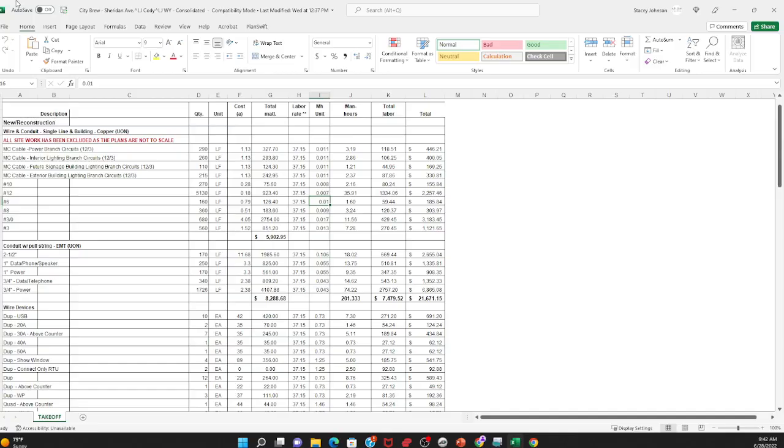These prices are guaranteed for two weeks, and at the end of 1 week, I would just be checking on your supplier because you may have to change it. Nobody's trying to work for free. So it's just gonna take you following up. One of my clients, I do get an update on the wire prices every 30 days from him.